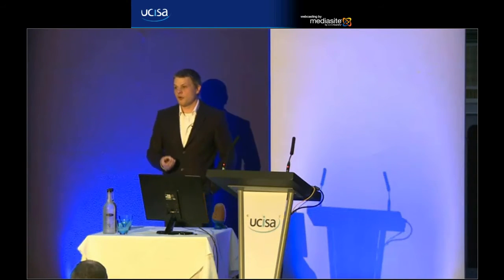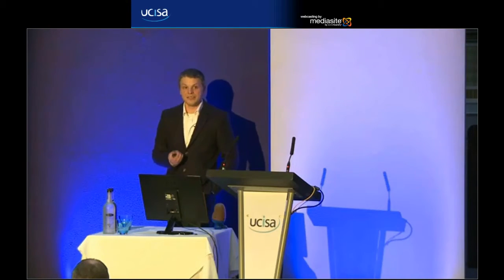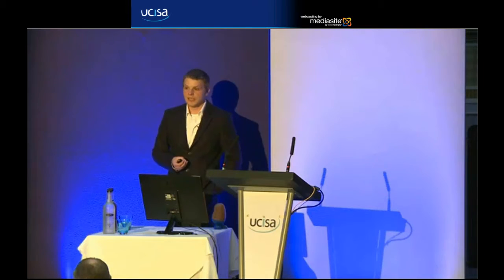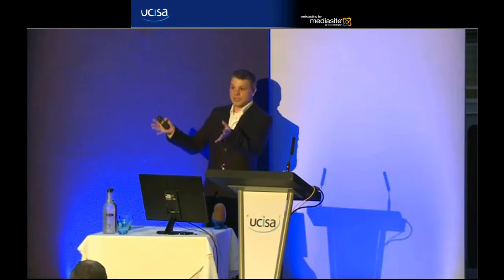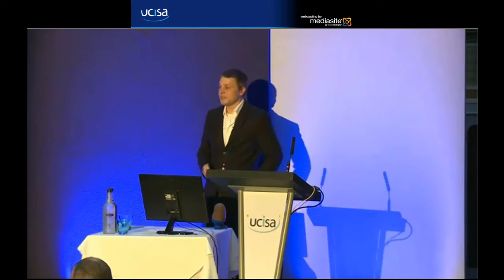This is how many points worth of work the team can do in each sprint. And at the beginning, you'll make an estimate of that. Usually we go with half, depending on how much resource we've got, half the points effectively gives us an estimate.